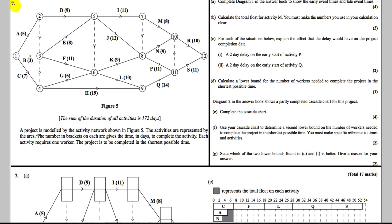Question 7. We're told a project is modelled by the activity network in figure 5. The activities are represented by the arcs. The number in brackets on each arc gives the time in days to complete each activity. Each activity requires one worker. The project is to be completed in the shortest time possible. The sum of the duration of all the activities is 172 days.